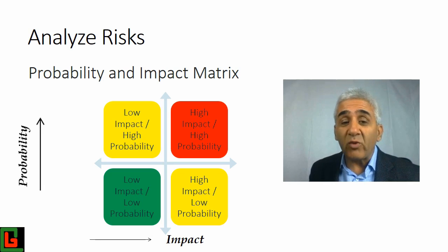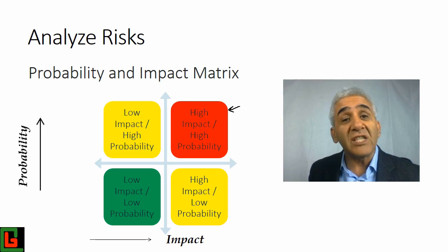So this is where we have divided our risks into 4 bigger classes. If it's a high impact and high probability, it is red. So these risks definitely you should be attending to, because there is a big chance of these things happening, and if they happen, the impact of that will be significant. So high impact, high probability here are shown in the red box.